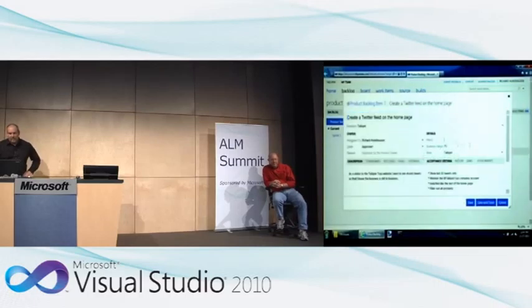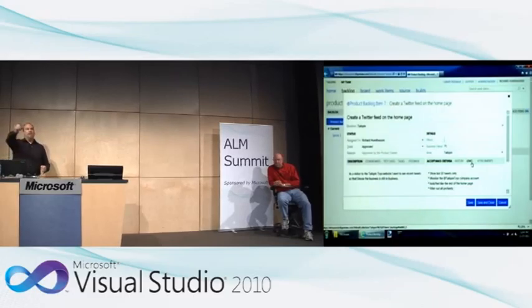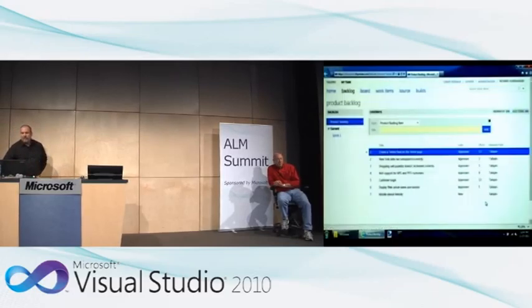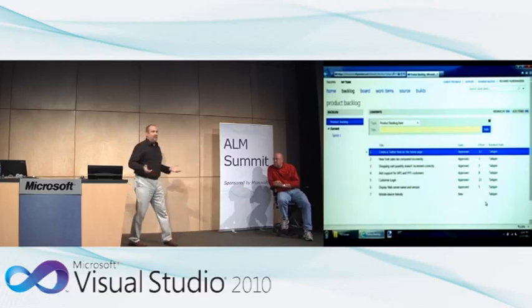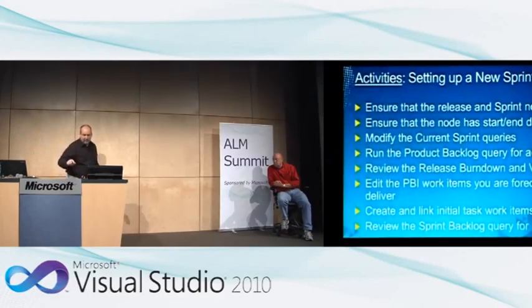Yeah, so we'll need to maybe give this a really big effort. What do you think? Pull out the poker cards real quick. Looks like 13s. Good job. All right, so it's a 13 effort, but it's still a high business value thing. You know what? The product owner wants it, understands that maybe all your team can do that sprint, really pushes it as being the top ordered item. So going into the sprint planning meeting, back to here.